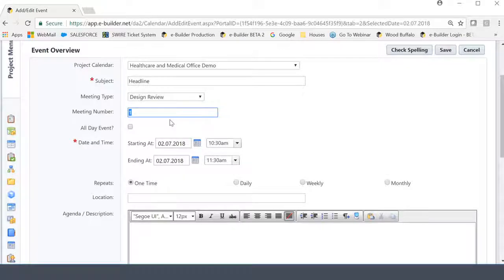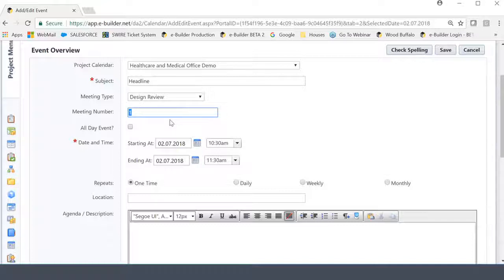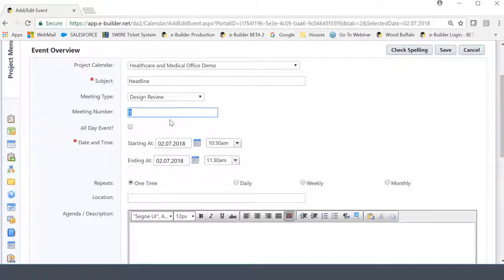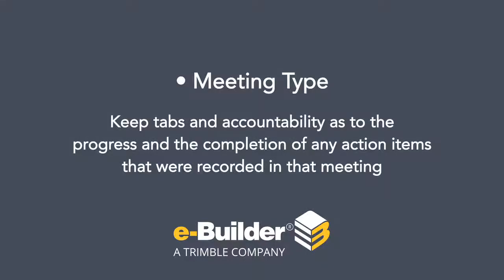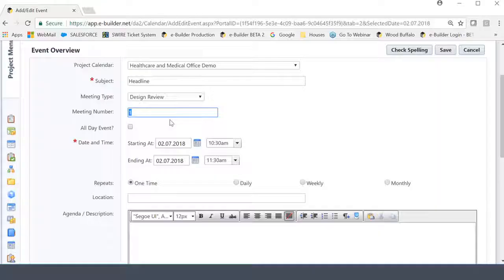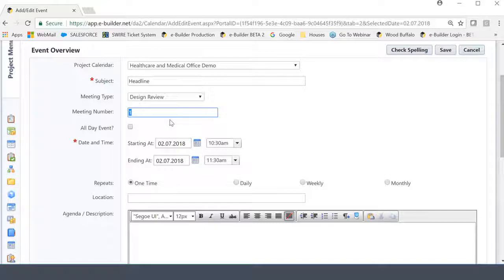So, for instance, if let's say there was an issue we were discussing related to a hallway, and we initially brought that up in a design review meeting number one, and there was some sort of an action item or something that someone had to do, when we have design review meeting number two, we can actually reference what was discussed in design review meeting number one and keep tabs and accountability as to the progress and the completion of any action items that were recorded in that meeting. That's something I'm going to show you in the next video when we actually go through actually recording meeting minutes. But I want you to see the value up front and understand the importance of selecting the appropriate meeting type here for reporting purposes.